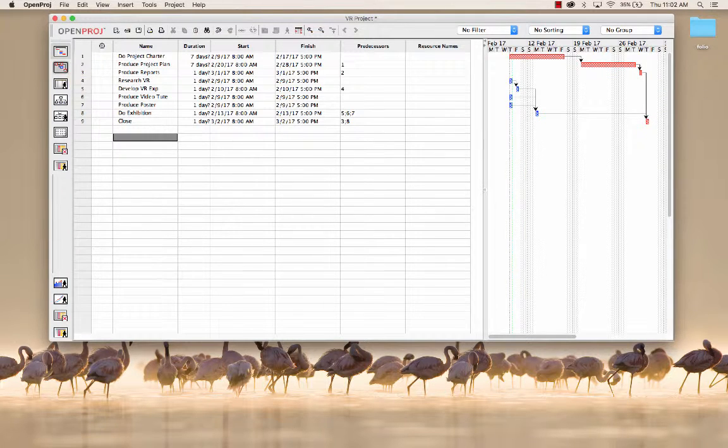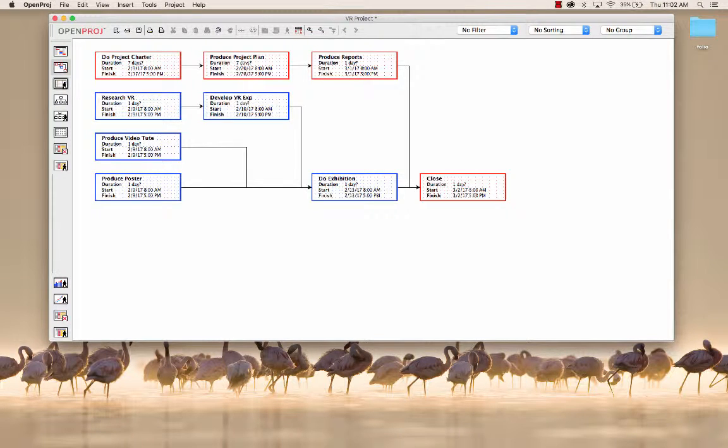And what we see here in the second view is a network diagram that shows that more clearly. This then in the red is the critical path. If any of these tasks take longer than we planned, it moves the entire project finish date. These blue ones are not on the critical path. If we take an extra week or a day, then that won't affect the closing, the finishing date of the project.